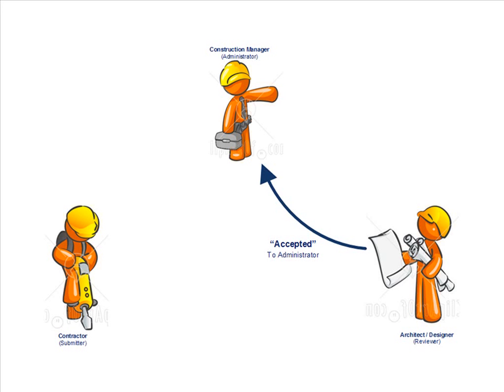The construction manager, assuming that the item has been accepted, will go ahead and then issue the approved or the accepted submittal items to the construction team and allow the ordering of materials and equipment and the proceeding of construction. In some situations, the architect or the design team will not like information about the items that were submitted. And in this case, they may reject the items and send it back to the construction manager. And in this situation, the overall process starts all over again.